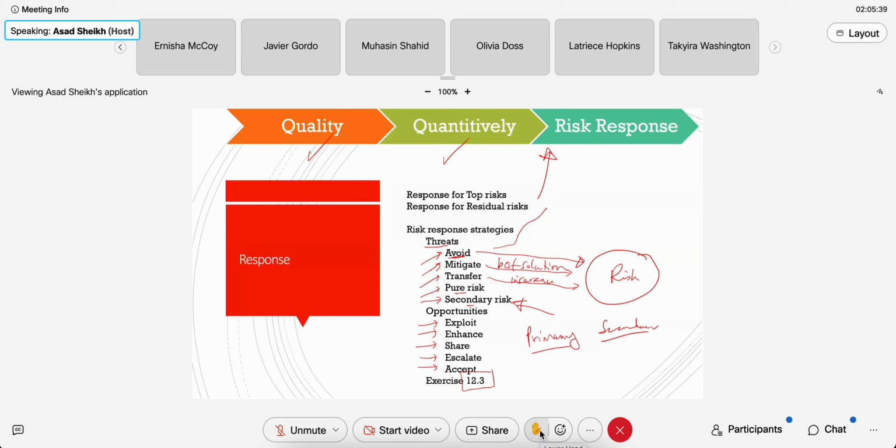I have a good example of that. Sure. So the primary risk was we lose a development resource. The fix is easy: we just bring another resource. The secondary risk is we lose the knowledge of what was happening at the time. And bringing a second resource, it will take some time to ramp them up. So the secondary risk is we'll lose a week or a week and a half, 2 weeks, whatever, of knowledge transfer or catch up.